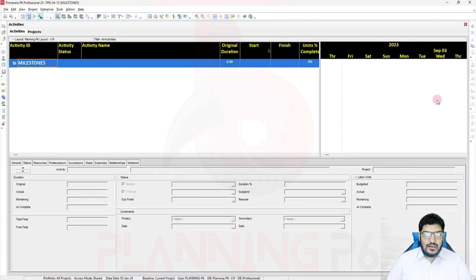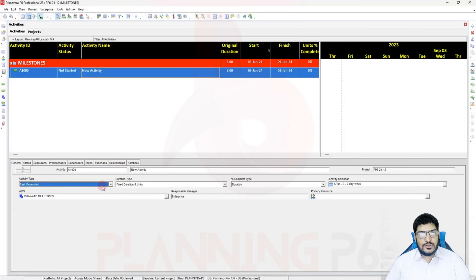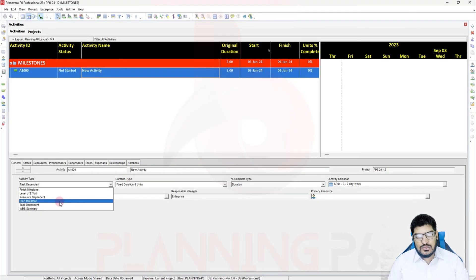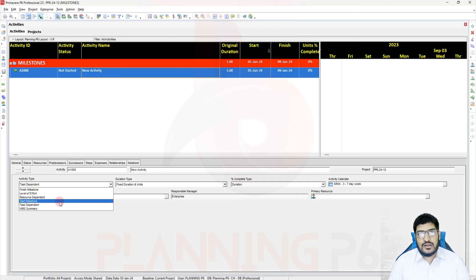Open the project. After opening, I have added one activity in Primavera P6. If you see the activity type in General, or you can add the activity type column, you can see there are only Finish Milestone and Start Milestone. Basically the milestone types are Start or Finish — that is the start point or the finish point of any activity or any project.